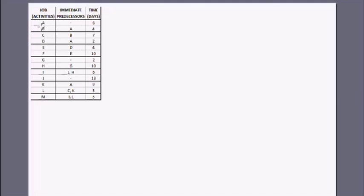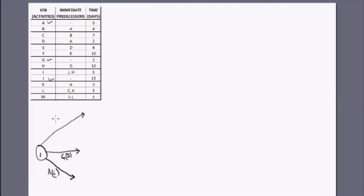We have 13 activities starting from A up to M, with their predecessors and durations given. Let's see which activities we can start straight away at time zero — it is activity A, G, and J. At the first node, node 1, we start with activity A (six days), activity G (two days), and activity J (thirteen days).